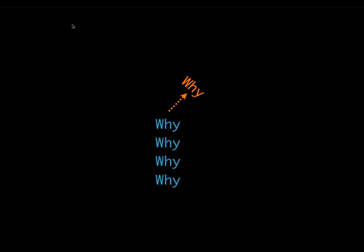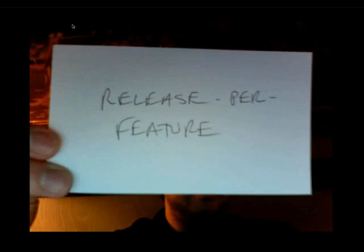The best way to start understanding what the buzz is all about is to start popping the why stack and start asking why. The main thing about Lean and the Lean approach to software development is release per feature — namely, when we finish a feature, we want the ability to release that to market. We want to get ROI as soon as possible. Return on investment is a function of time, so if we can get an idea, a concept to cash quicker, we're going to have a better ROI.